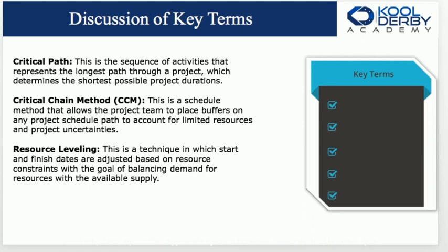So instead of somebody working 12, we divide the work evenly across the three. I don't know what I said anymore. 12, 8, and 4. So 12 plus 8 is 20, and 4 more, that's 24. I got lucky here. 24 divided by 3 is 3 people working 8-hour days. Does that make sense? What we're doing is leveling the work. But of course, it does mean that the folks are qualified to do the work. That's the other big piece.